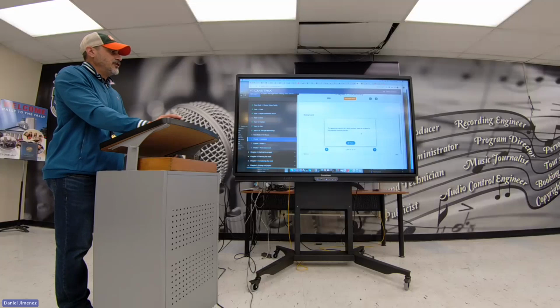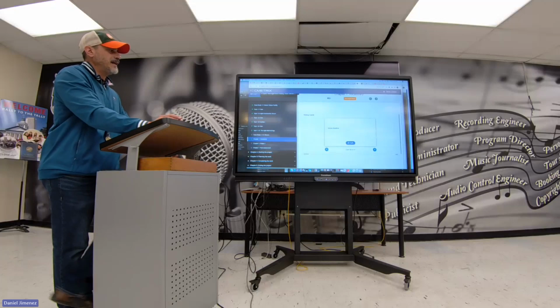The approved version of a work product used as a basis for comparison to actual results is called the baseline. The approved version of a scope statement, work breakdown structure, and its associated WBS dictionary that can be changed using formal change control procedures and is used as the basis for comparison to actual results is the scope baseline.